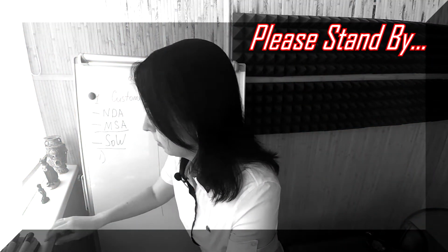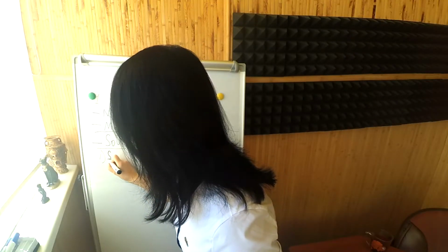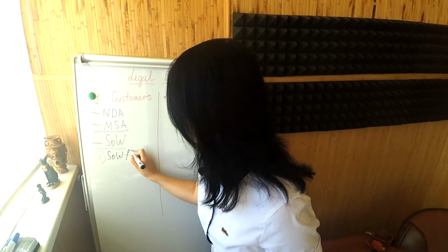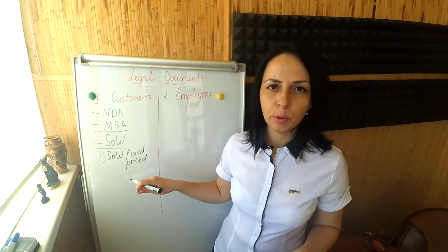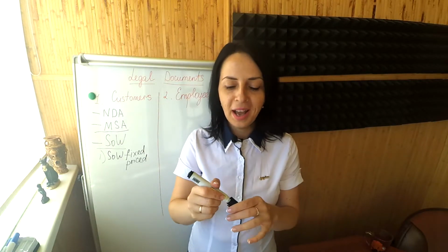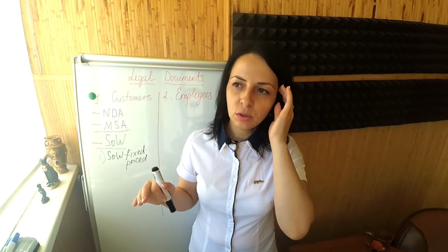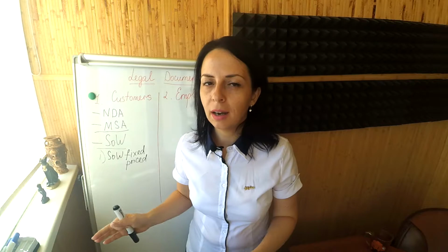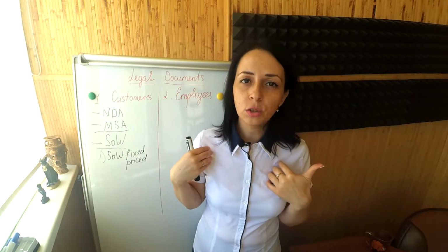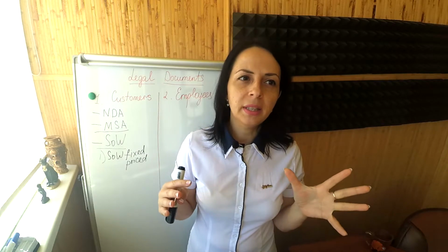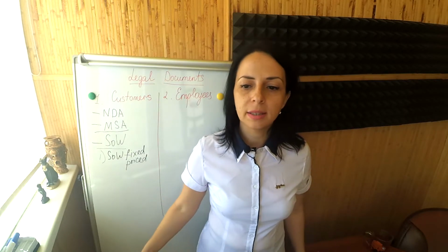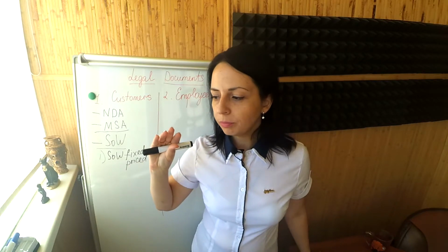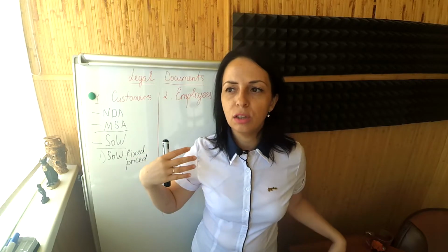First is a statement of work for fixed price. So, statement of work for the fixed price projects. Now, I strongly encourage you not to commit to a fixed price project, because all the risks in fixed price projects are on you, on the IT service provider, because typically the development never takes as much time as it has been estimated in the beginning, because always unexpected development issues arise and you spend more time